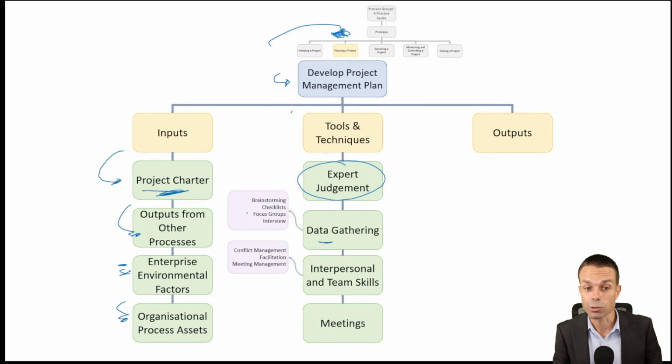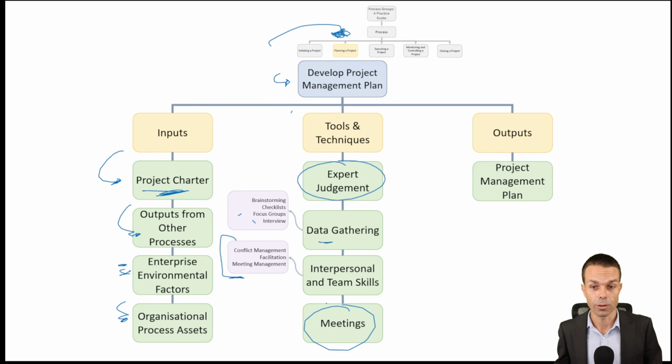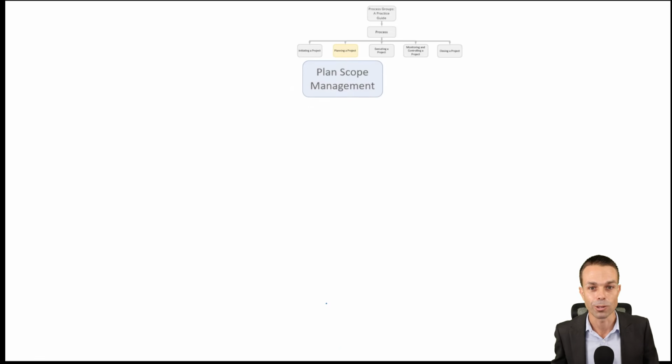Data gathering, focus groups, checklists, interviews, and interpersonal and team skills, conflict management as we create our project management plan, and meetings to facilitate all of those things. The outputs are the project management plan itself, and we'll be updating this as our project goes along.